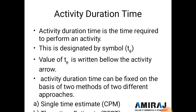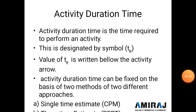Now, one of the most important points: activity duration or time. Activity duration is the time required to perform the activity. For example, excavation for a 3BHK bungalow foundation may require three or four days — that is the activity duration time. It is denoted by the symbol 'te', where 't' stands for activity time. The value of te is written below the activity arrow on the CPM diagram.